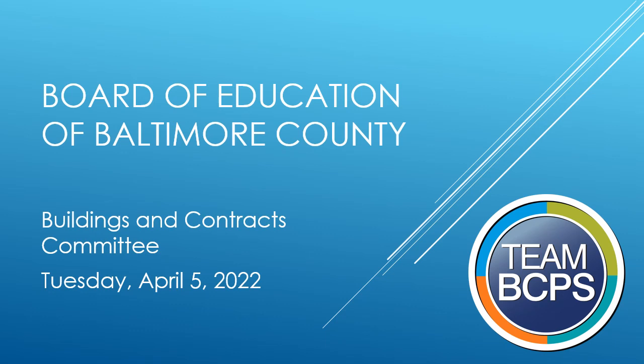We advertise all of our solicitations through eMaryland Marketplace, which is required legally. When we have a large school construction project like this, we also reach out to Blue Book, who is well known in the contracting and construction industry, and they will post it on their site for us as a project. And we also use the construction management firm, who will reach out to individual contractors or suppliers that they know in an attempt to gain more participation on these packages that can sometimes be a little bit more troubling.